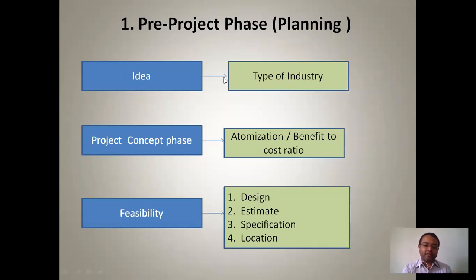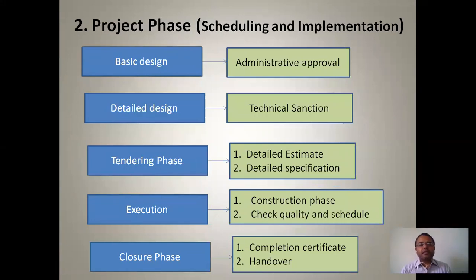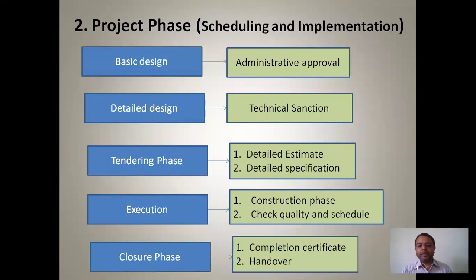So in the planning phase, all three things — idea, project concept phase, and feasibility — are at a preliminary level. We are going for an approximate estimate, not a detailed estimate. It's just a rough calculation for planning. The next phase is the project phase, which includes scheduling and implementation. In the first phase we just covered rough things — which type of industry, what level of optimization, where the locality of the industry is.